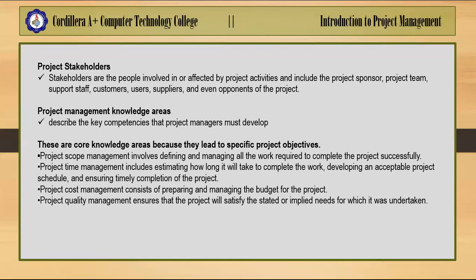We also have the project team. The project team for building the house would include several construction workers. It can also include electricians, carpenters, and so on. These stakeholders would need to know exactly what work they must do and when they need to do it. They would need to know if the required materials and equipment will be at the construction site or if they are expected to provide the materials and equipment. For example, the carpenter cannot put in the kitchen cabinet until the walls are completed.